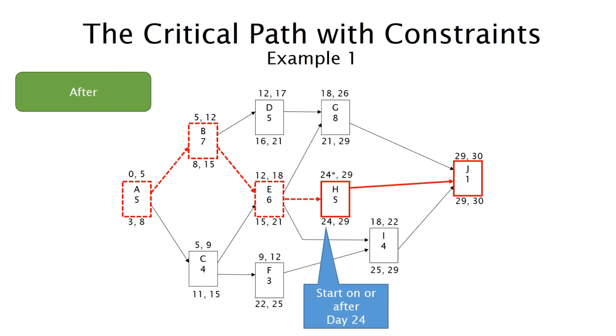So we'll go back one slide again. So you can see G is driving J to start on the 26th and finish on the 27th. But now we force H far into the future. H is now driving J.